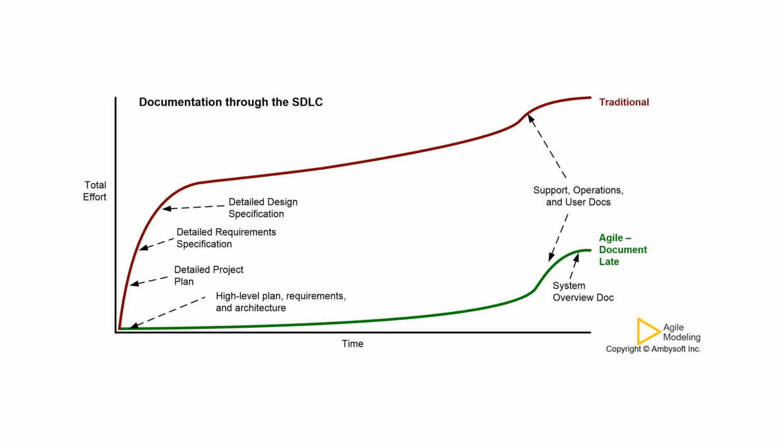In contrast, in the waterfall approach, a detailed design specification is produced before development begins, but the drawback is that the document will be outdated by the end of the development cycle. Otherwise, if you keep on maintaining the document, then that is additional cost and time for the project.